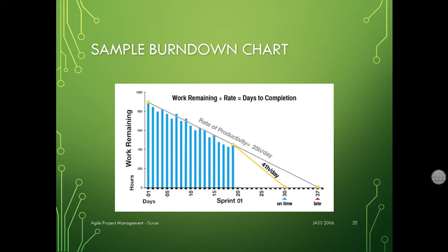And there is software that would help you do that, like Microsoft Project, by the way. Microsoft Project has that functionality. You can add items with weights already in the software itself, and then it would deduce these charts automatically. Otherwise, you have to build them yourself. Okay? Still, it's your choice here. And I think one of the sections, probably the next or the one after that, will show how that is being done in Microsoft Project. Right?